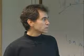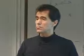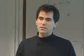Lesson learned is establish standing interface working groups with mandatory participation from the SIs. The SIs kind of have a different paradigm. The science instruments are usually built by universities. And the universities are typically staffed by grad students and some full-time engineers, but usually the paradigm and the thinking process is a university atmosphere.